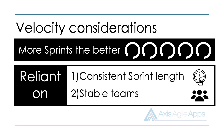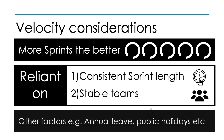And so is a stable team — that's the second variable to be mindful of. If your team is being changed each sprint — new people joining or people being replaced over and over again — that will also impact your velocity and make it very unreliable. Make sure your team has a consistent sprint length and is a stable team that is not changing too often. Finally, you do want to consider if anyone is going to be on leave that sprint and reduce the points accordingly, along with other factors like public holidays or company events.